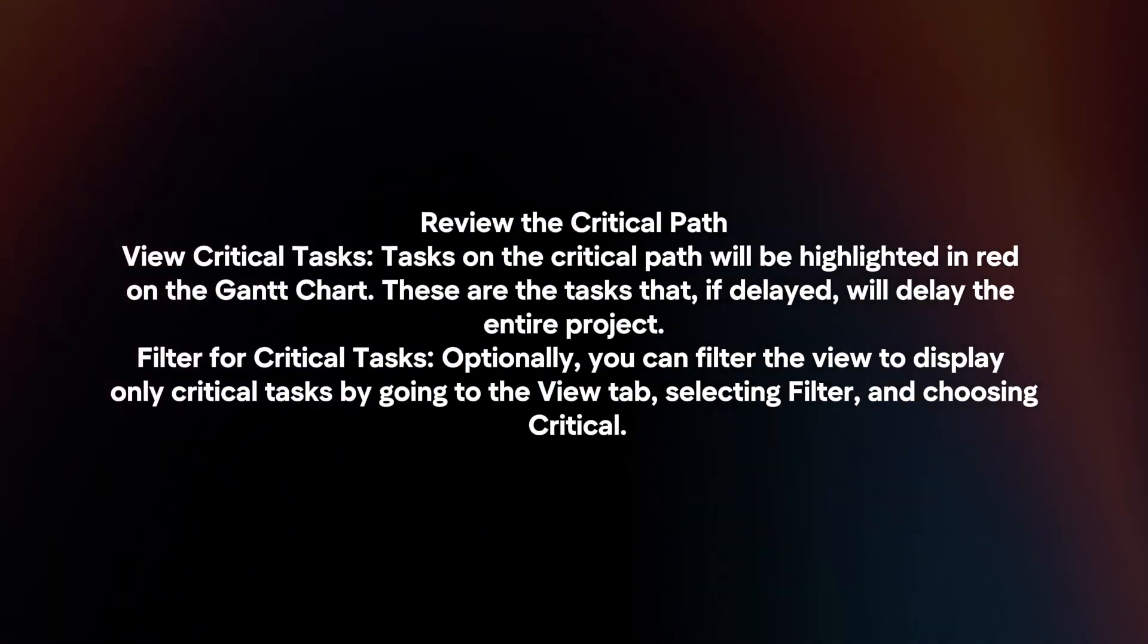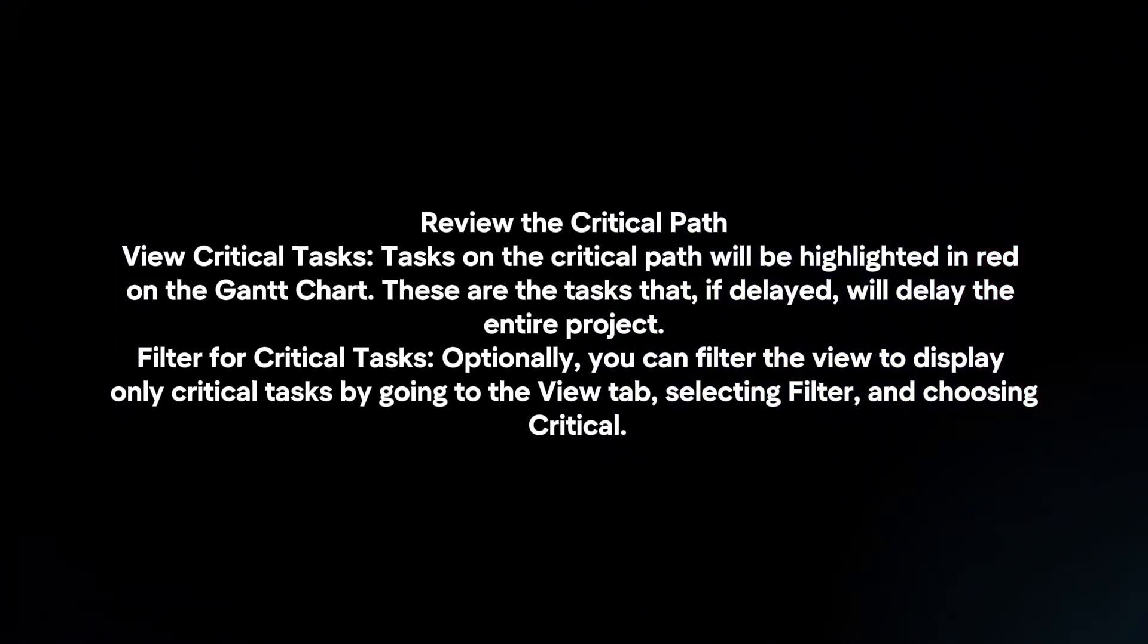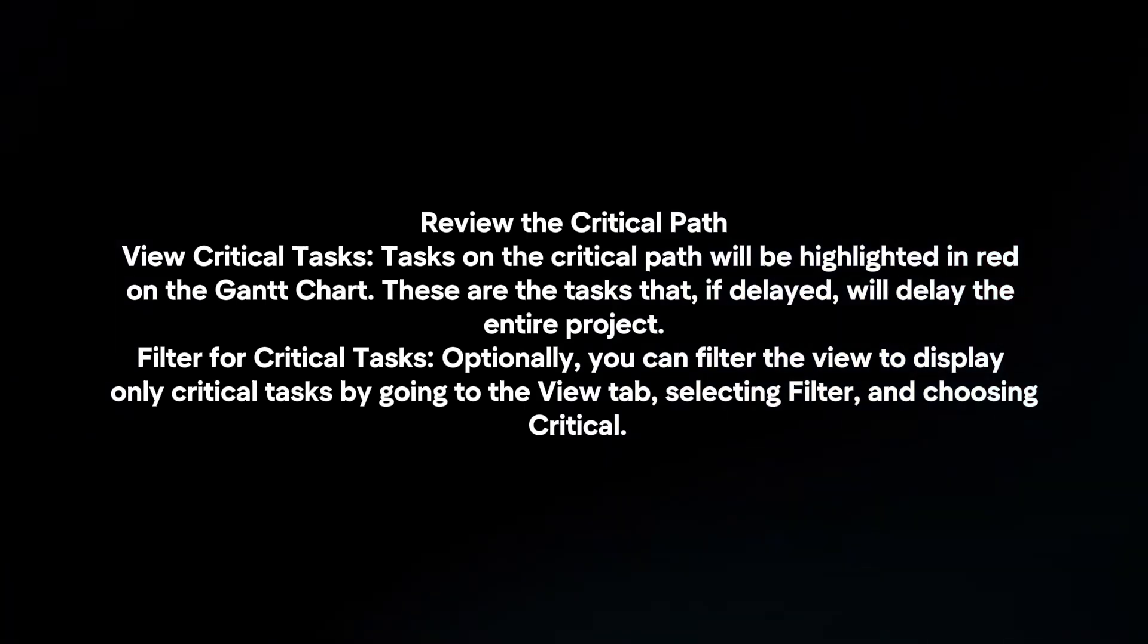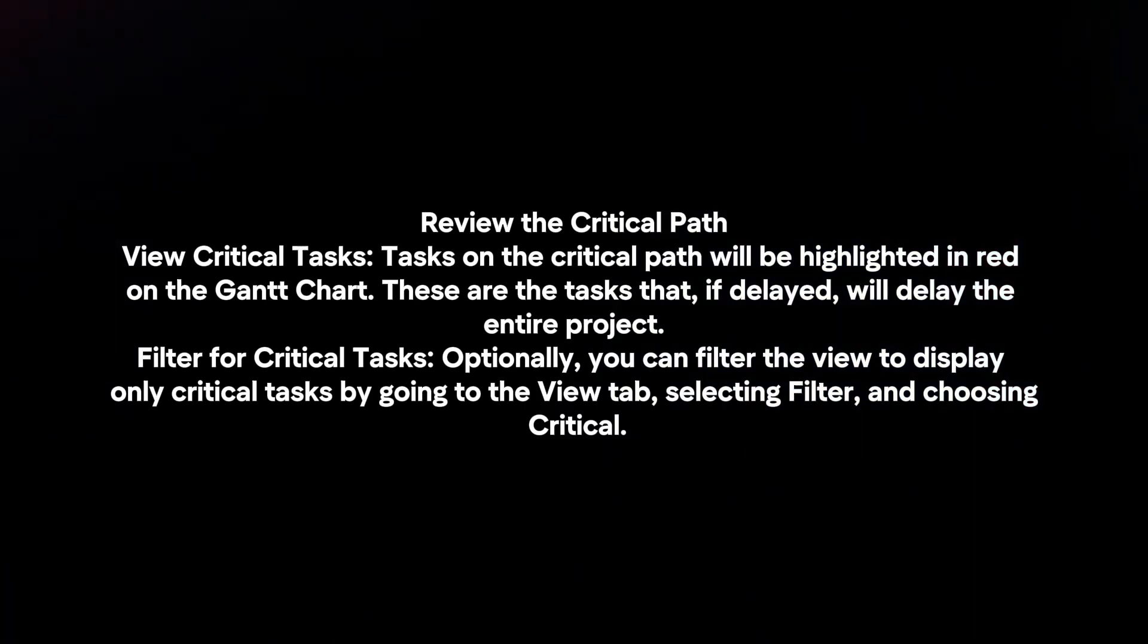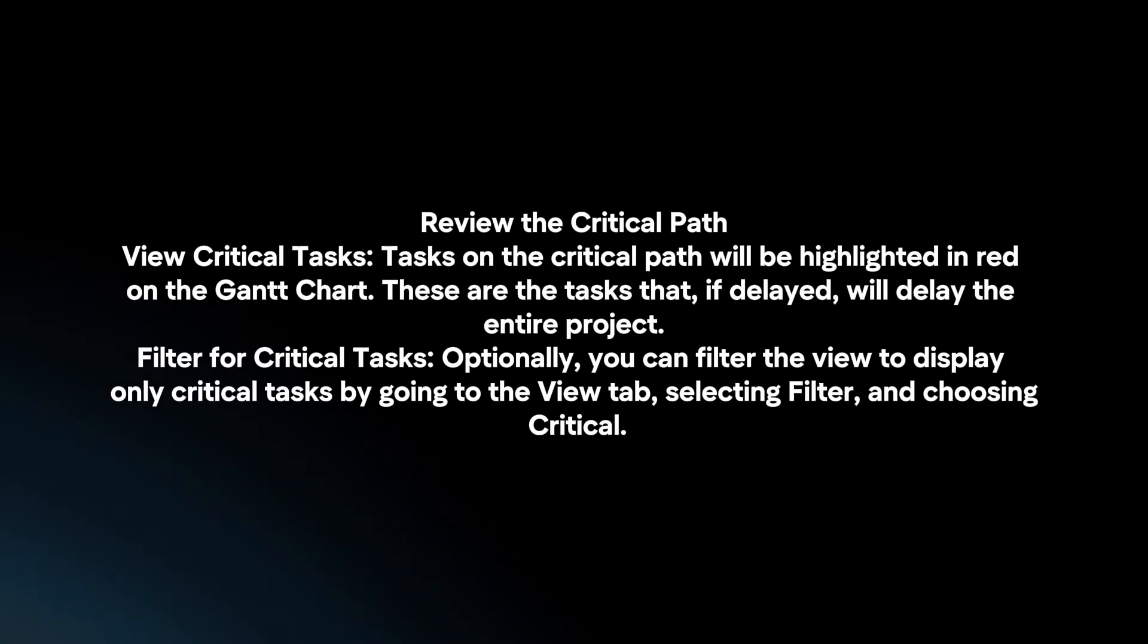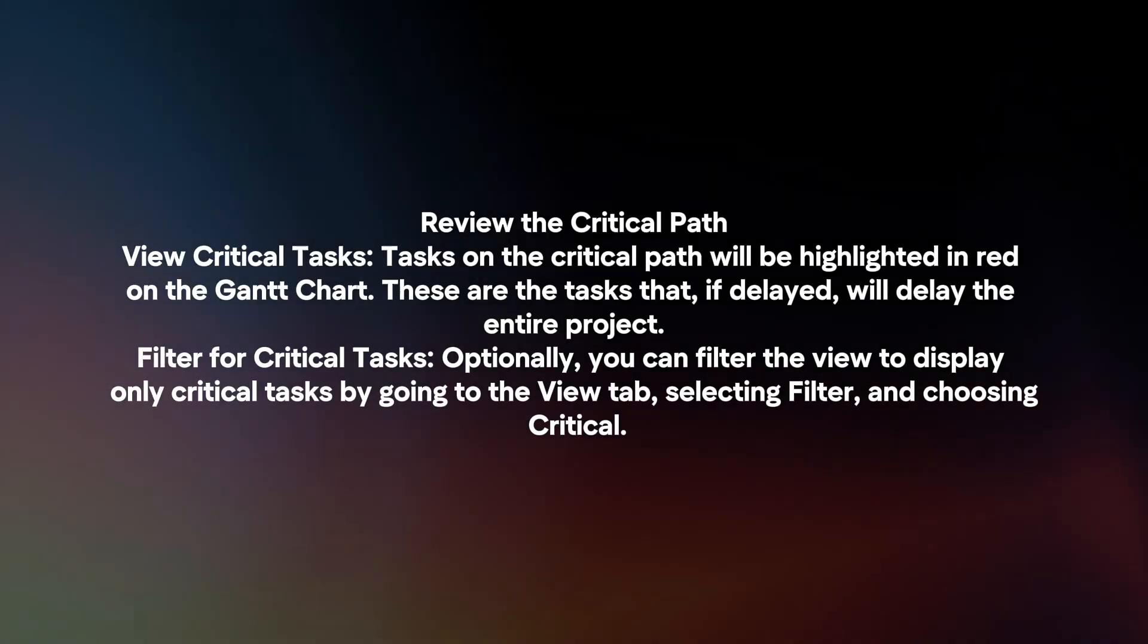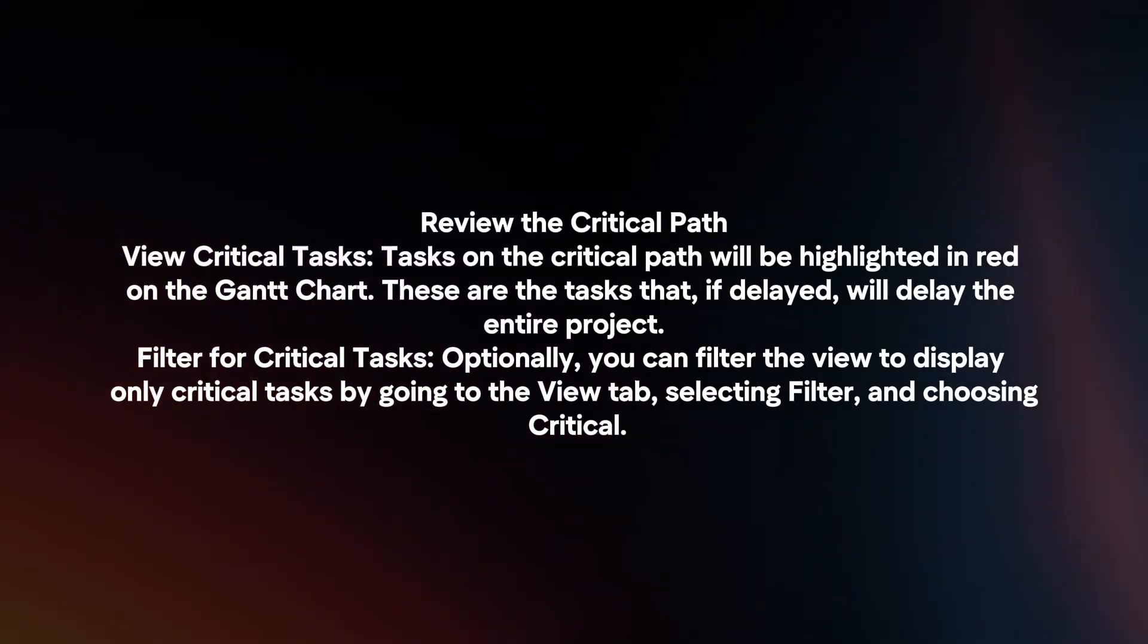Review the critical path. Tasks on the critical path will be highlighted in red on the Gantt chart. These are the tasks that, if delayed, will delay the entire project.